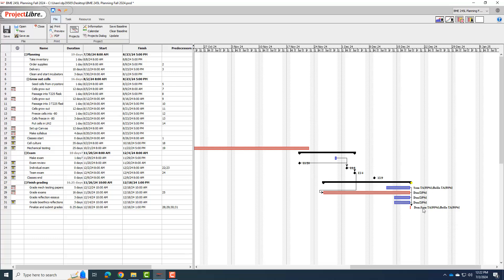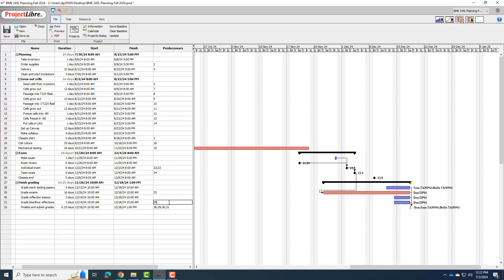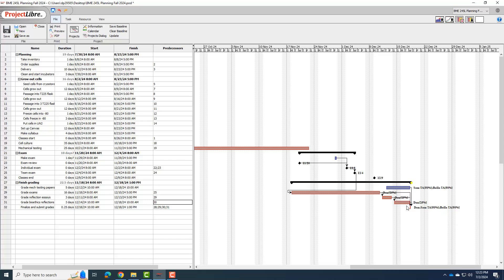Another option was maybe spread out some of the work amongst other members of my team. But you can see I already have my TAs scheduled for 50% work, which is their max. So I don't really have that. So I recognize I have to move some things around to make this work. One easy thing we can do is we can make sure we use the predecessors. And so some of these things, although they aren't technically required to use predecessors, I can just set them up that way so that I'm not doing things simultaneously. And so I'm going to make the bioethics reflection, I'm not going to start working on that until I have finished grading the reflection essays. Same thing, I'm not going to start grading my reflection essays until I have finished grading the exams. So again, now at least it doesn't have me working on three things at the same time. I'm only working 25% of the time on any given day on grading. So that is a step in the right direction.